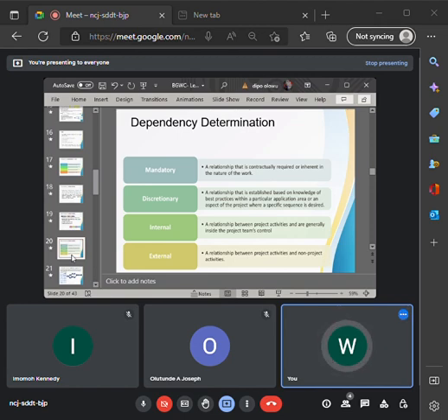I don't know if you see some people who you advise, this thing we want to do this way, we can do it this way. They can give you their reason, 1001 reasons. You say, well, we know that it will give you the same answer, but we prefer it this way. That kind of idea is what we refer to as what? Discretionary dependency. All right? There are best practices for what you need to do, but the project manager or the organization preferred a desired sequence. They say we like to follow this pattern, don't worry yourself. It becomes what?